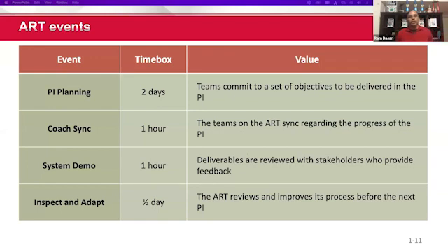So the teams have already looked at their capacity and loaded those stories they'll be working on, so it will be a good plan to start with. They also identify the dependencies and they have a visual map of those dependencies in the ART planning board. The coaches sync also happens, which is also called SOS, Scrum of Scrums meetings, every week, where the RTE, release train engineer, coordinates and invites all the Scrum Masters to attend. This is where he takes a pulse of the progress of the PI, how teams are progressing.